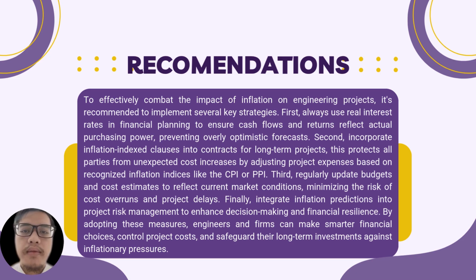This is to protect all parties from unexpected cost increases by adjusting project expense based on recognized inflation indices like the CPI or PPI. Third, regularly update budgets and cost estimates to reflect current market conditions, minimizing the risk of cost overruns and project delays.